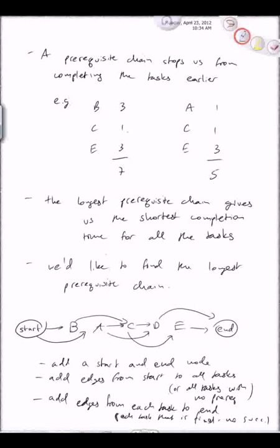And now we have a decision about where to put our various costs. We can either pay for task B on the way into node B or on the way out, and this is going to have a different meaning. If I pay for node B on the way in, then this node denotes the finishing time of task B. And if I pay for node B on the way out, then the node denotes the start time for task B, because of course I'm paying after I leave the node. So let's have these be finishing times. Let's pay on the way in.